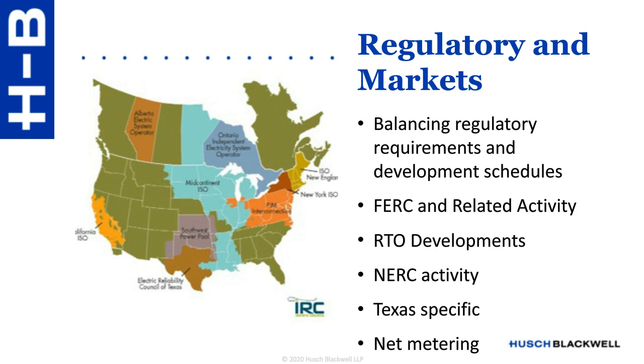And they would lay out a similar plan towards achieving regulatory approvals and registrations and interconnection studies and interconnection agreements in a way that overlays with and is consistent with project development schedules, as well as how to build in some flexibility for the fact that a lot of these utilities and RTOs and state agencies operate on a different schedule than a commercial development timeline, which is a crucial thing to understand and work with.